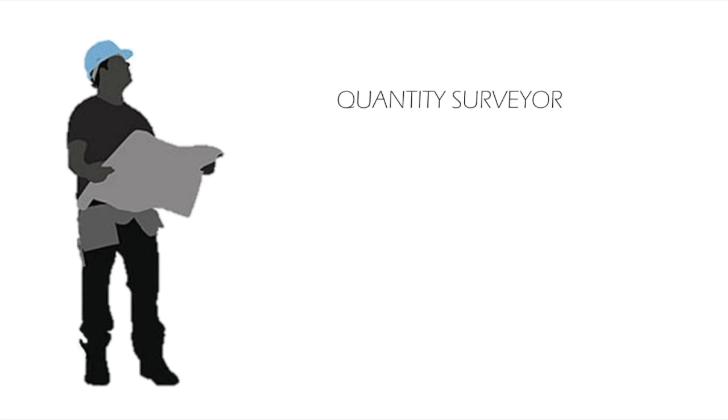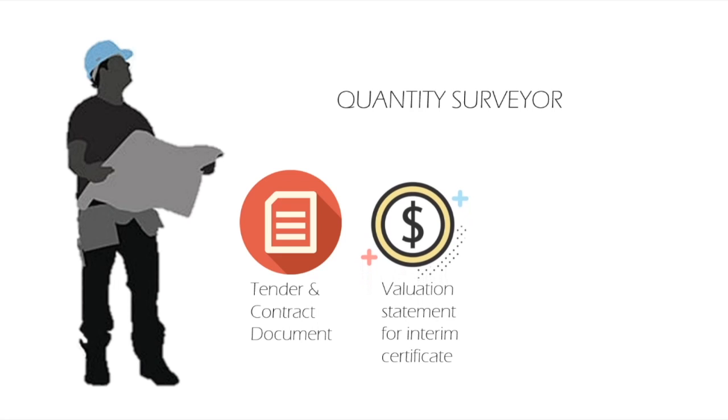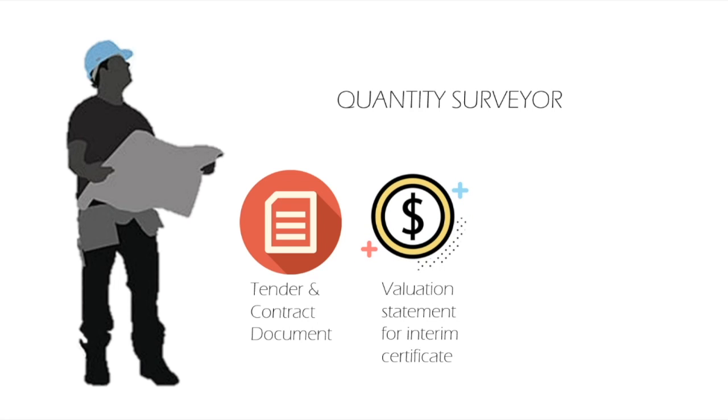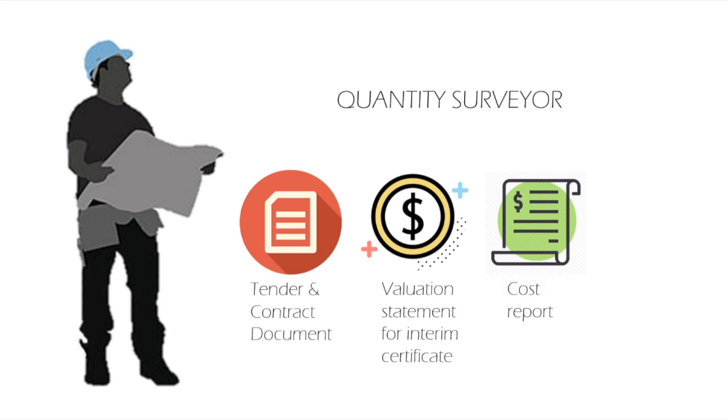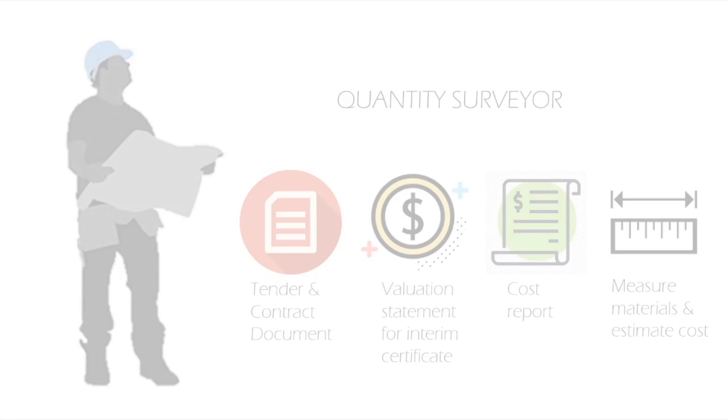Next up, we have the quantity surveyor. His main roles are preparing tender and contract documents, including bills of quantities for the architect and client, prepares valuation statements for interim certificates, prepares cost reports regularly and measure and estimate the building's material costs for the project.